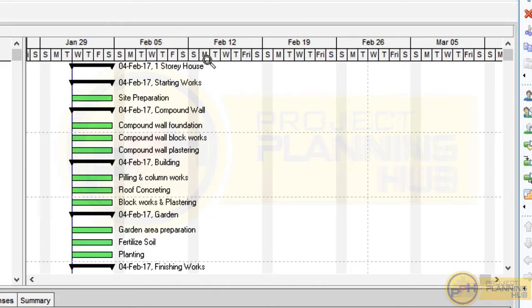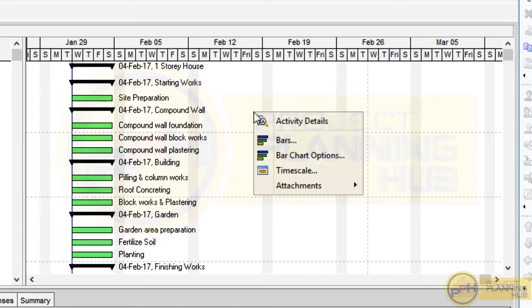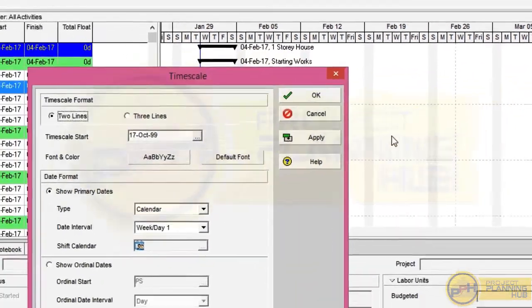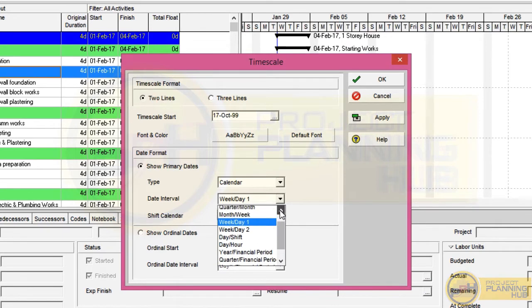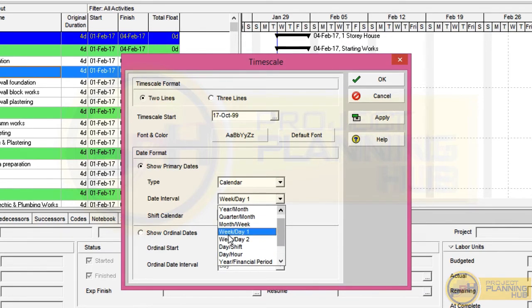The top area of the Gantt chart is called the timescale. The top row is week-way splitting and the bottom row is day-way splitting. In your Primavera the timescale format may be different. To modify the timescale, right-click in that area and select the Timescale option. It will open the timescale window. Select the two-line option, then go to Date Interval and click the drop-down to select the format you need. Let's select week per day.